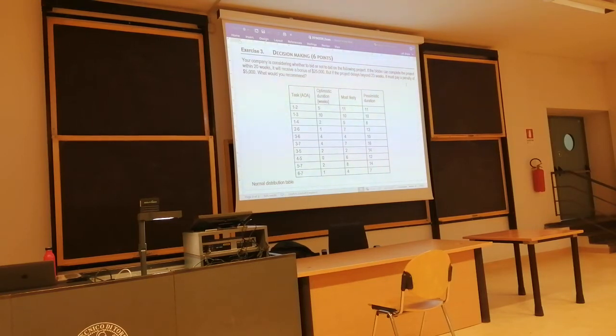With those pieces of information on hand, you may want to calculate by using the average durations, then computing the variance of the critical path, considering possible merge node biases. You remember the merge node problem? Because multiple paths may merge, the probability for the project is the multiplication of the probabilities of all paths merging into the final node.